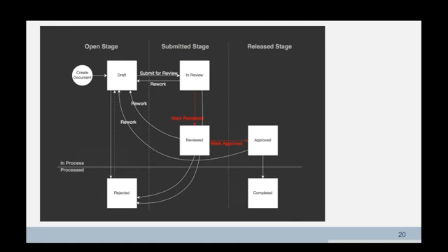It means that approval is not just one phase of the requirement lifecycle, even though there could be a status called approved. You really need to make sure that before it even goes for the final approval, some people will sign it or mark it as reviewed. Many of our customers who are using Polarion to manage requirements for medical projects or aerospace projects really need to ensure that the specification can go to production only if it was reviewed by a functional safety engineer, and if it was reviewed from the architecture point of view, that the architecture was designed properly.